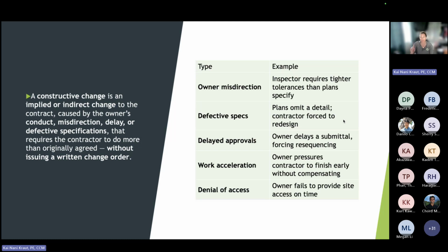If it is a change, they must provide the notification as laid out in 104. So that doesn't waive their right of notification. They still have to do it. So if they don't orally notify you by noon the next day, if they don't follow up in writing, 30 days later, they come back and say, you know what, when I had to do that plan stuff, that was a change. If they didn't do notification, they didn't follow the process, they have waived their rights under their contract. We don't have to do it.